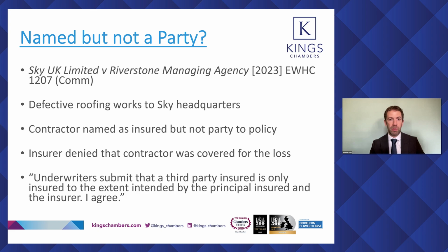So in this type of construction case, that usually requires an analysis of the extent of the insuring provisions in the building contract between principal insured, so here the employer, and any other named party, e.g. contractor, subcontractors, etc. And often that will be the extent of the inquiry. There won't be anything else. It will just be a question of what the building contract says.